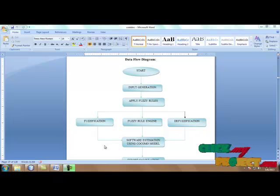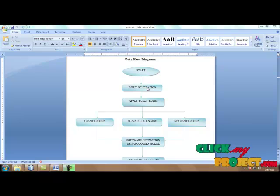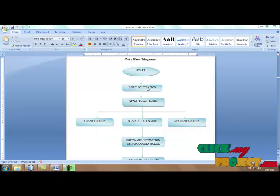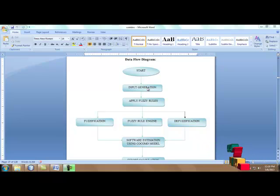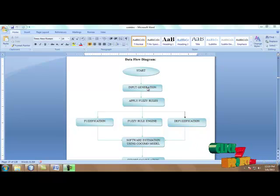Here is the DFD of the process. First we move to the input generation model. In input generation we have to select the inputs for our cost estimation process. The inputs are estimation name, source lines of code, cost drivers, and scale factors. Here we use three scale factors and price cost drivers.